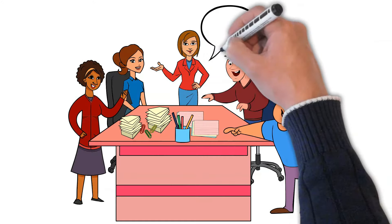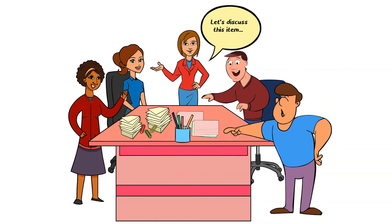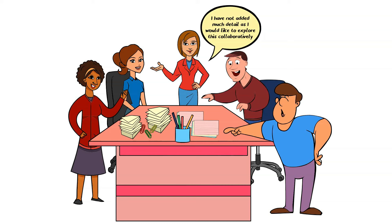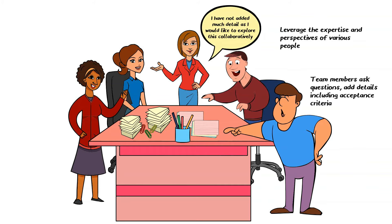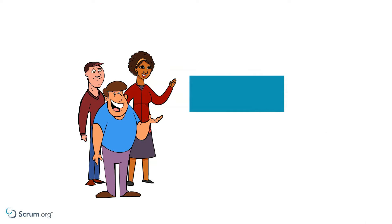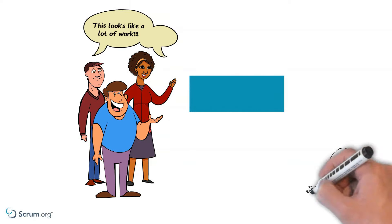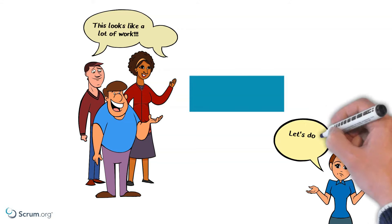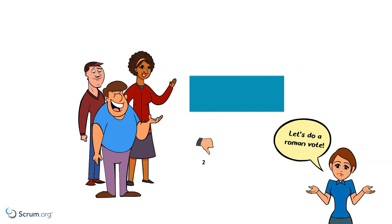Next, the team looks at a Product Backlog item that was added at the last sprint review and placed high upon the backlog. It has a brief description and some high-level acceptance criteria. Cassie did not want to put too much detail in beforehand, as she believes refinement is a great opportunity to leverage the team's expertise to help her refine this item further. Blake, Nisha and Steve ask Cassie questions, and together they update the Product Backlog item. During the discussion, they quickly come to the conclusion that this Product Backlog item would be a lot of work. Robin asks if the developers think they can start and complete the item in one sprint. They decide to do a Roman vote. Blake and Nisha vote with their thumbs down — they don't think it will fit within one sprint. Steve shows a thumbs up. They briefly discuss the results of the vote, and Steve finds out that he forgot to take a few things into consideration. They all agree the Product Backlog item is too large, and with some help from Cassie, they break it down into smaller items of value and add those to the Product Backlog.